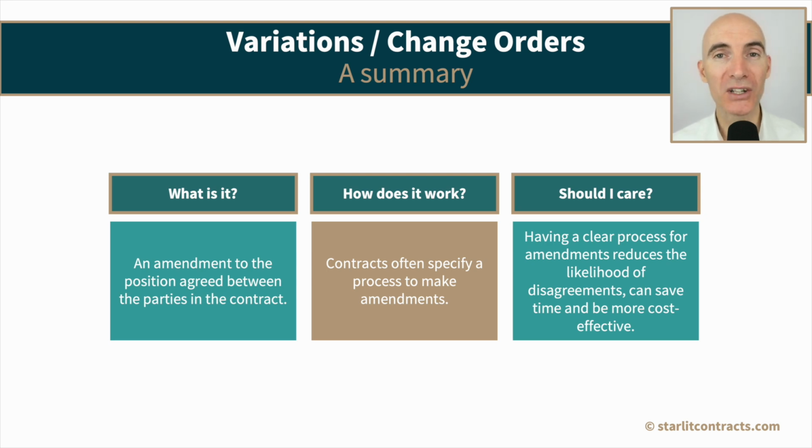How does it work in practice? Well, contracts will often set out a methodology for parties to follow in case they want to make an amendment to the contract. Is this something that you should care about? Well, it really depends on your contract. Is there any possibility that it might need to be amended at some point? If so, it is helpful to have a methodology that describes what you need to do in case of amendments before there's an obligation for one of the parties to start to perform that amendment.